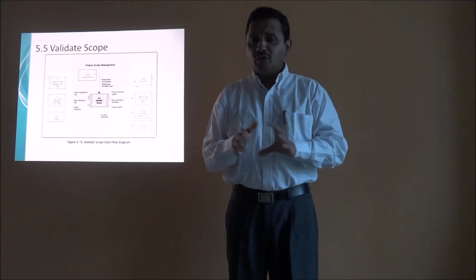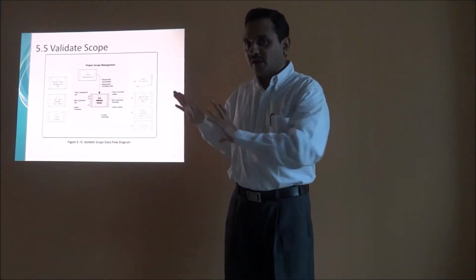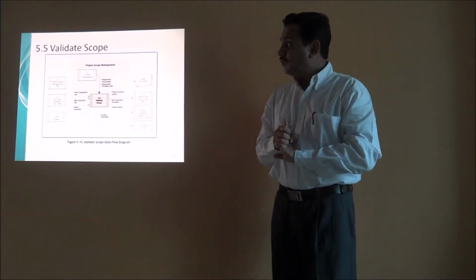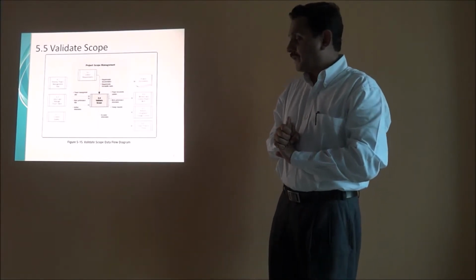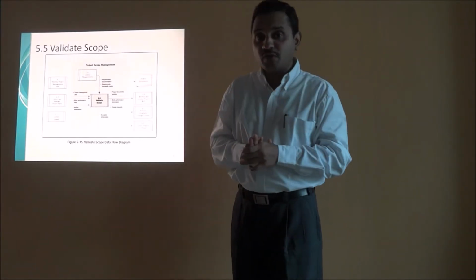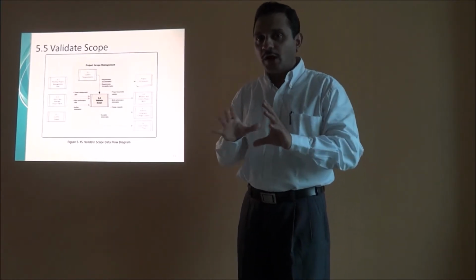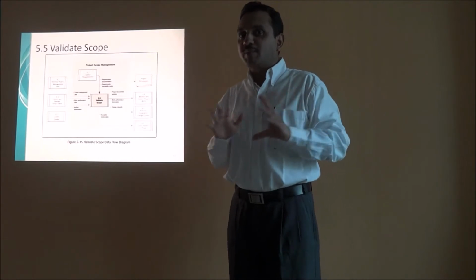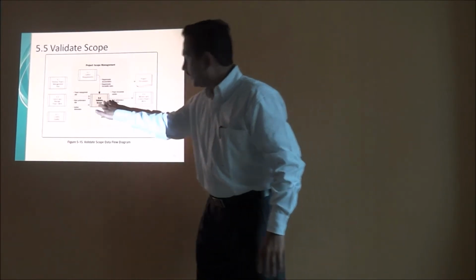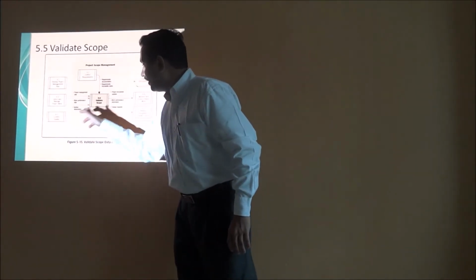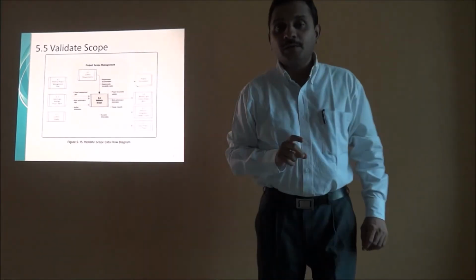Now you heard the story, right? Interesting, isn't it? Now I'll talk about how I will contextualize the story to tell you about the data flow. Now let's take that story and let's understand our data flow. Mrs. D'Souza had come for acceptance of the flat, and before that the quality control department had already come and inspected the flat. Look here, input to validate scope is control quality.